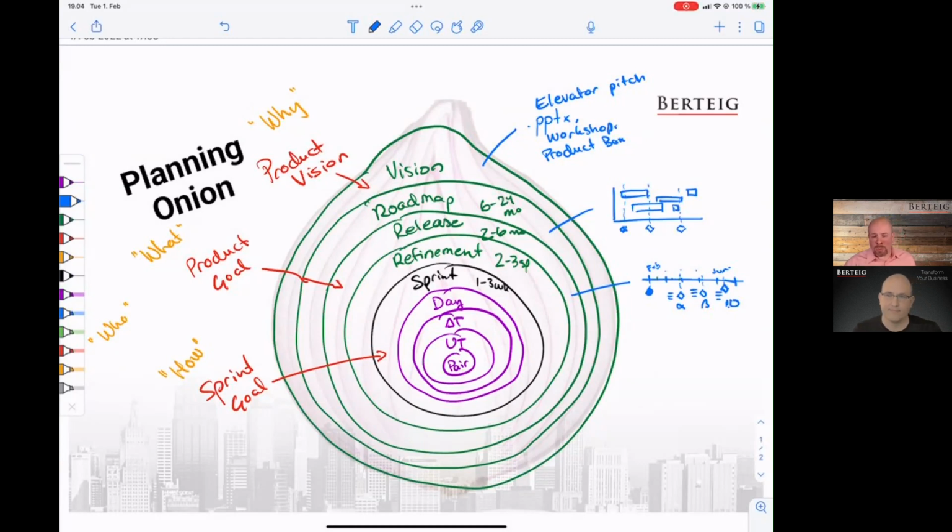Just to provide an example, in one project, the release date was set to the 15th of April. There were many reasons why it had to go out that day, and I wasn't going to argue. This was a planning meeting 6 weeks before that release date. The product owner basically said, we have 6 significant features that we need to have in that release before we can really push it live.